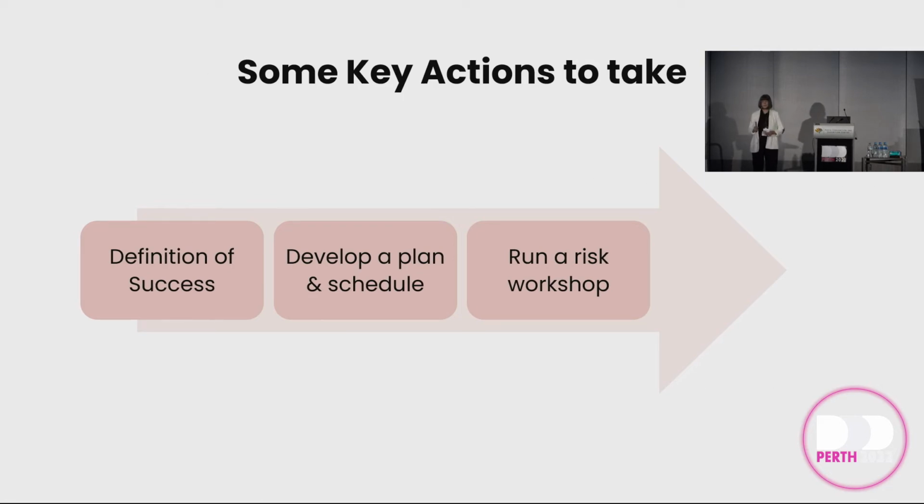And the reason you need a different risk is that you then need to get an owner for all of those risks. So the owner for the one about the finance people would be the finance manager. The owner for the one about the IT people would be the IT manager. And then more important still, they have to take some action to make sure that it is mitigated. So define the risks, identify the mitigation and the owner, and then make it happen.